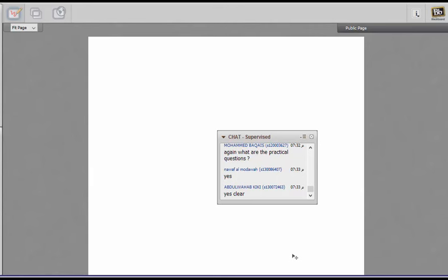Any change that needs to be implemented in the project during the project execution has to be properly discussed and properly described before a decision is taken whether to implement the change or not, and this decision is taken at the level of change control board, which is responsible for defining and deciding whether a change can be implemented or not. This is the last important question from chapter 4, which is a short question and you can be asked something about it. So there are a total of 6 important short questions from chapter 4.